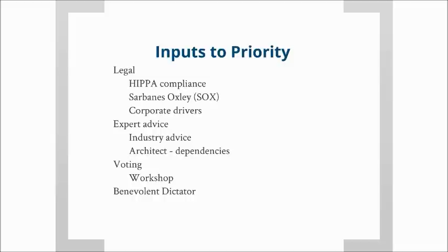If you go and set it on the shelf, when you come back to it 3 months later, you're going to have to do this thing called context shifting. You're going to have to get your head back into that code and kind of figure out where you were and what was going on, and maybe go back and talk to the customer again. And that is all taking time to do that, and time's valuable in software development. Also, it could be, if you're waiting 3 months, the developer has left, and now another developer has to come in and work his way through understanding that, and it's just messy when you do that.